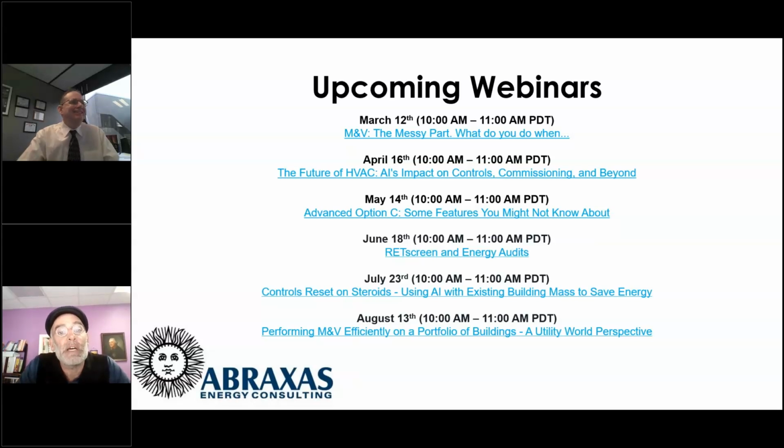You need the salesmen to understand so that they could put that into the contract. There's this extra O&M time, and that could be profitable if we have extra time. Granted, then your retro commissioning isn't going to have a 2-year payback anymore. It might be a 4-year payback, but it's still a good project. It's still palatable, as long as it's not kicked from 2 years to 15 years, you're still making money.